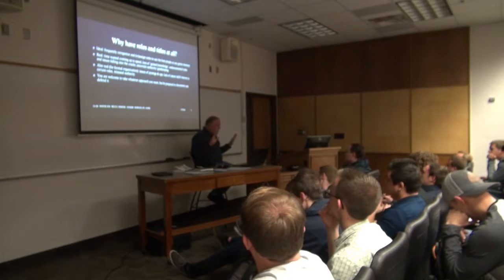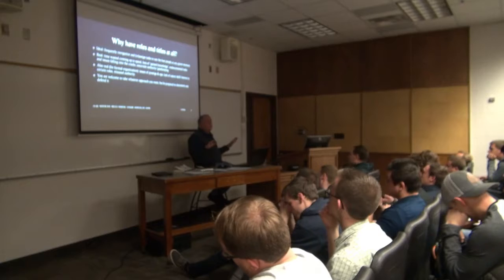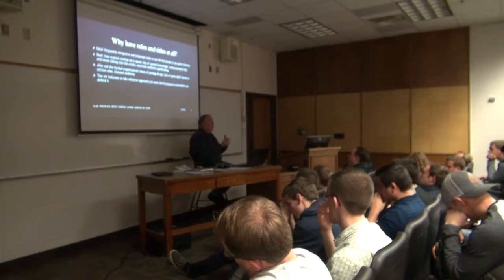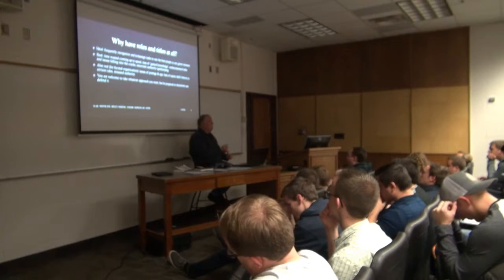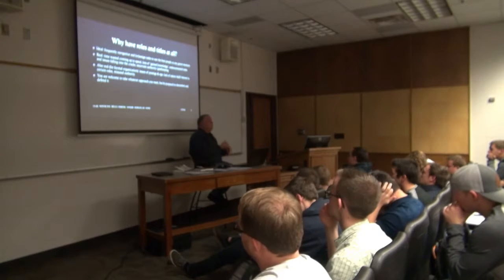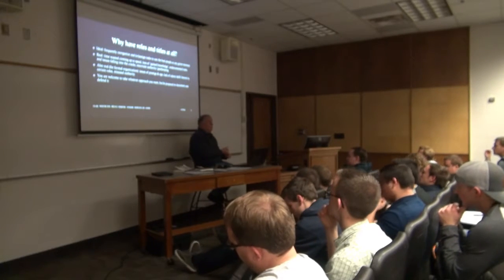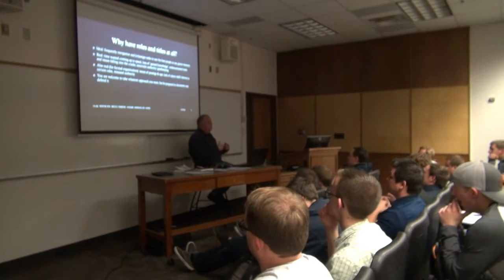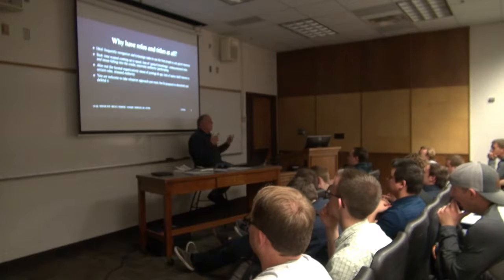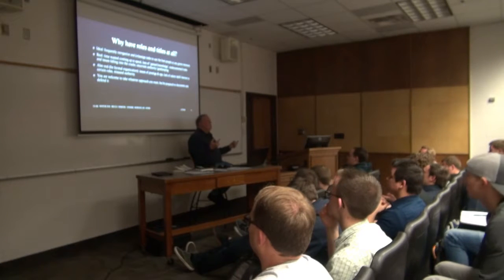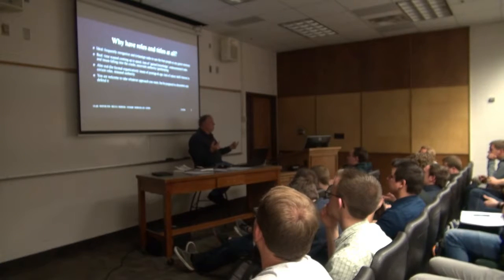So the reason why you have an organization is because you want to determine what gatekeeping each person is responsible for. This isn't ready until I say it's ready, or you come and take it from me. You want to define what problems each given person is responsible for solving, and you want to define the lines of communications, because as you add people, the number of potential communication links goes up exponentially. 2 to the n minus 1, minus 1. Yeah, forget the exact. It's roughly there.